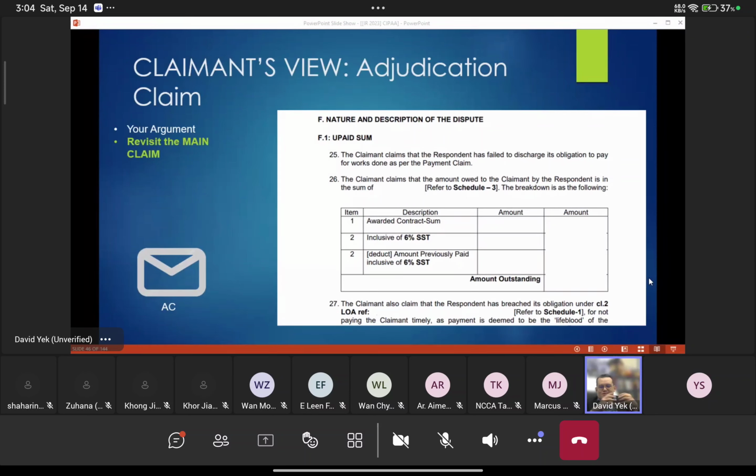So you have to say that usually the claimant is engaged to perform this, and the claimant has completed this, and the claimant has submitted this. After the expiry date, notice has been given, money is still not coming, therefore the dispute arises. Something to that effect. Okay, so you have to give a cerita, a factual cerita. You cannot just give what you would call a fictional story.